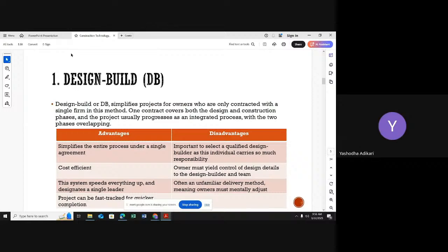And then with the design changes, the client again should contact the contractor and should submit the received drawing to the contractor. Right? Meanwhile the contractor has been waiting for that design. So I have to submit it to the contractor and tell him, okay, this is the change of the design, and please construct my house based on this. Right? So this process definitely takes some period of time. Normally it takes time because I have to contact 2 different persons, 2 different companies, right? There is no interconnection between the design team and the construction team.